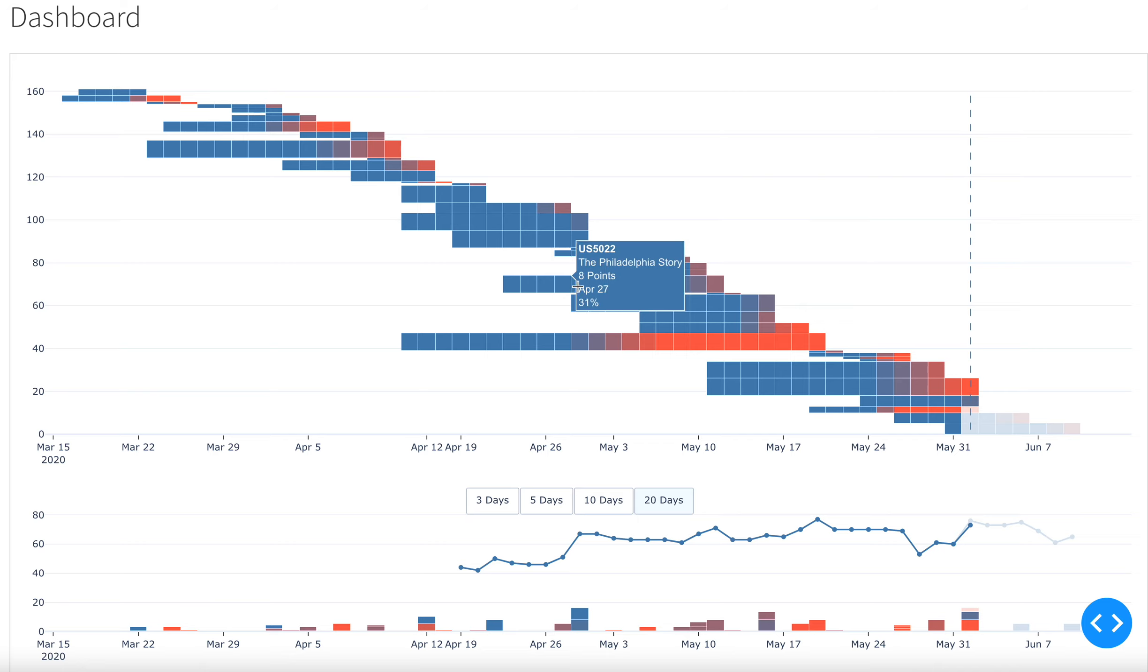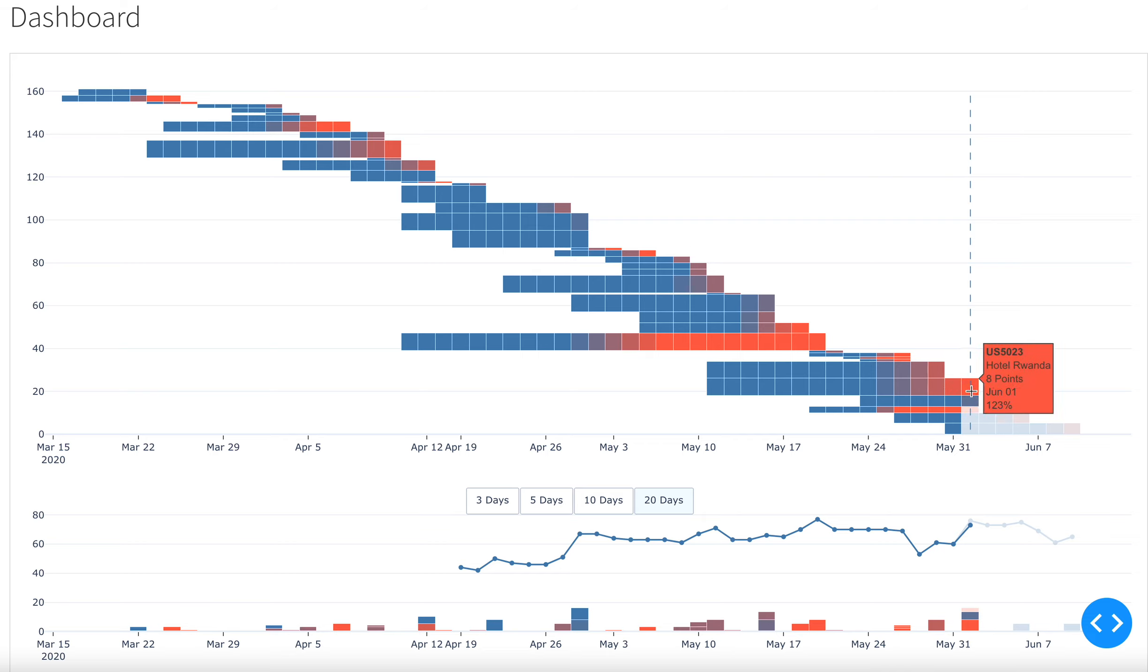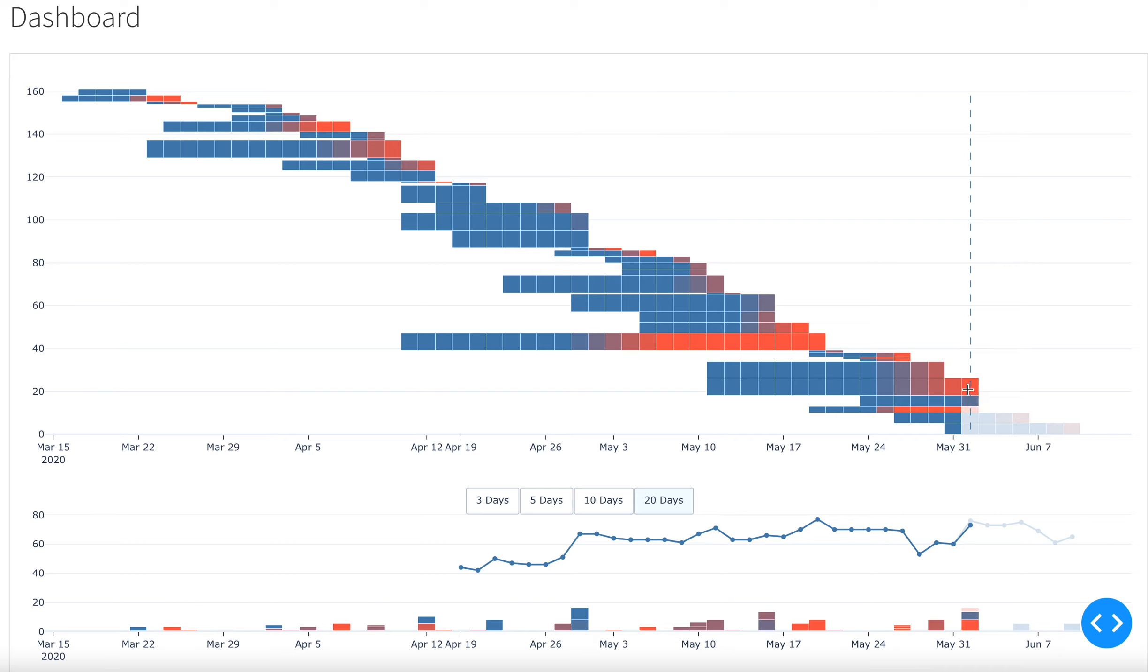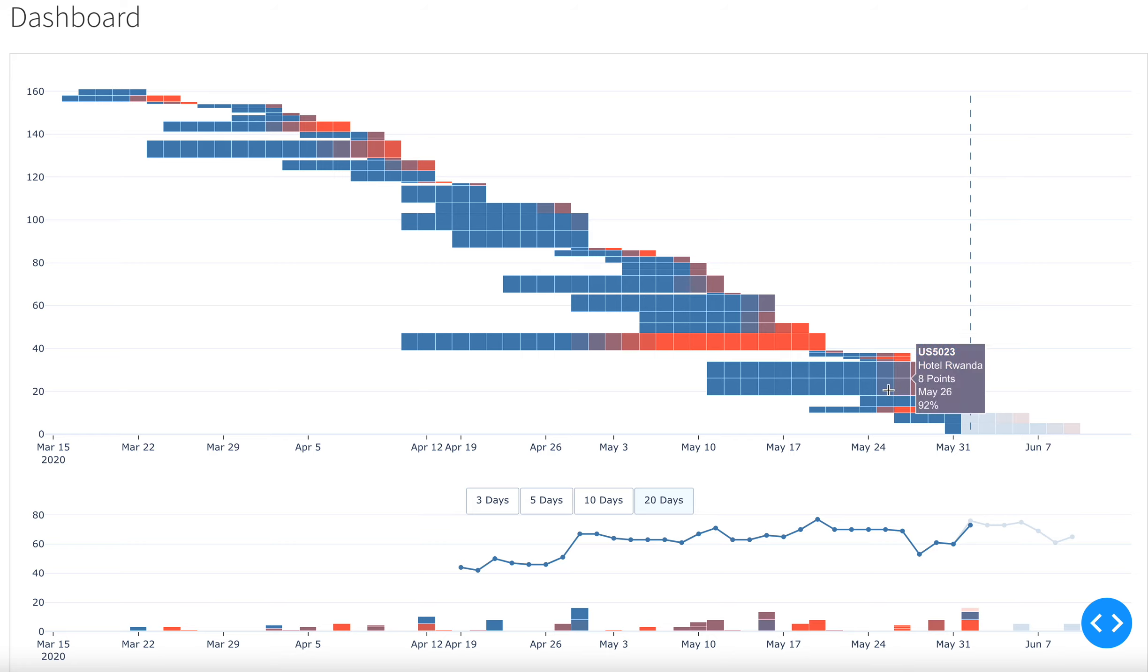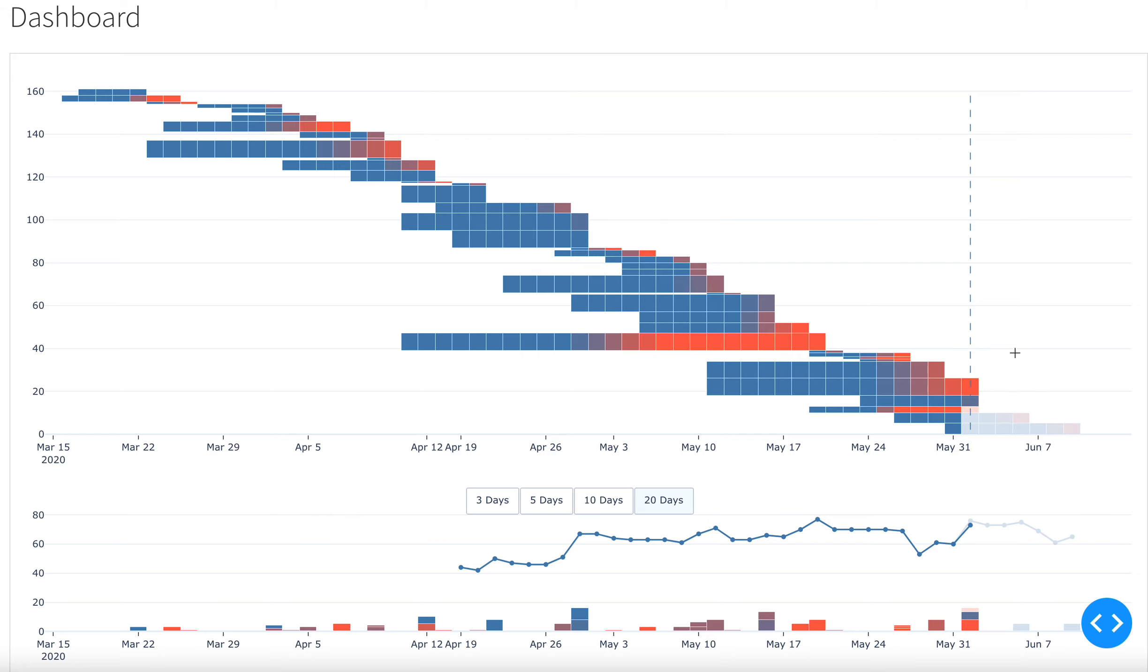I find this very useful, both on a day to day monitoring basis, because you see this information also for in flight stories. For example, this one hasn't completed yet and is already a bit past due. So in a standup might be good to ask whether any help is needed here.